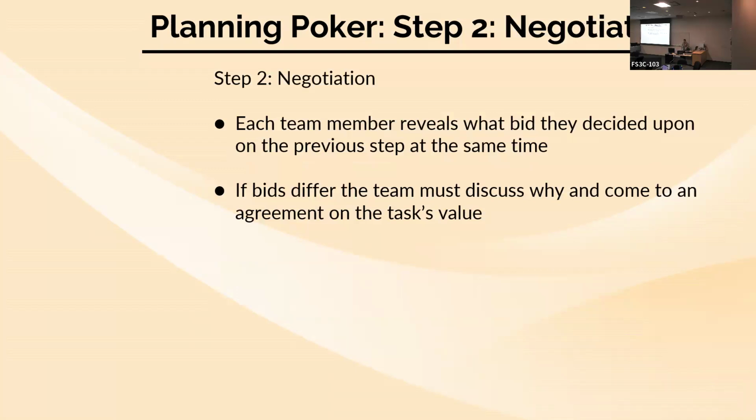All right, once we have gone through that step, where we had every user story estimated and we put our bids together, then we come to the negotiation or the valuation on them to understand what is the correct value for our team. Discuss why our bids differed for one reason or another. You bid a 3, you bid a 13, what's the difference between you two? Why was this one an issue?